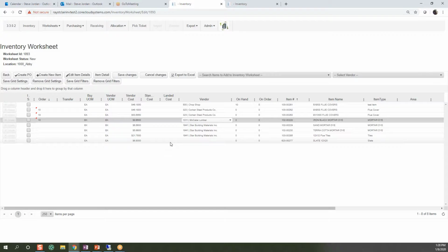So this worksheet gives you the ability to, think through this, go to the field and, on a mobile phone, put in a purchase request for material. When they go in and look at it, they only see these items because that's what's been estimated on the job. They can select how much they want at this point in time, and it will automatically come in and update the grid. So there's no double entry, but it comes in as a batch. It creates the new worksheet and it comes in as a batch.